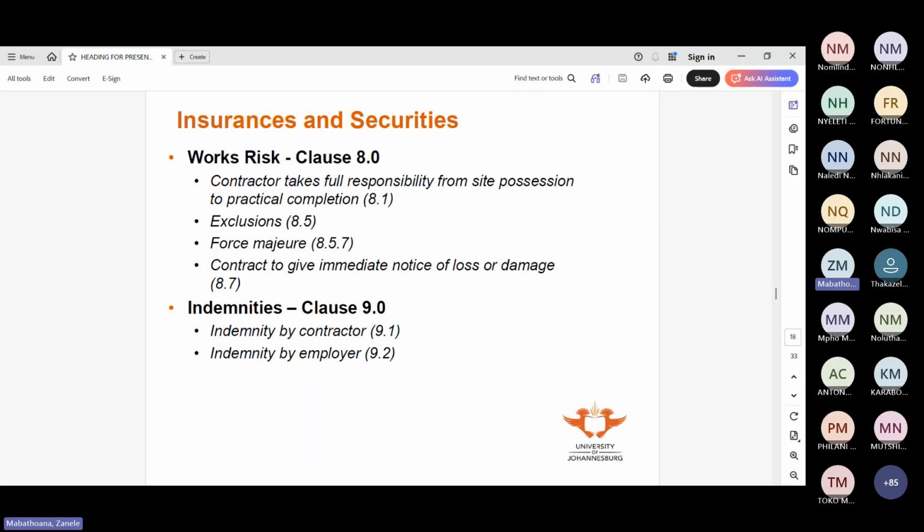For us, it used to be SABS 0400 before it changed to SANS, but I know it changed. So you use SANS 1200, and that specifies, because with JBCC, if I dig 20 cubic meters of soil, when I fill up that place, unless I'm creating a platform and going higher, the understanding is I'm going to fill it with 20 cubic meters. But when you're building a road, it's SANS 10400, yes. There's an understanding that you're going to compact.